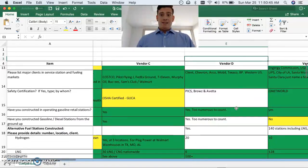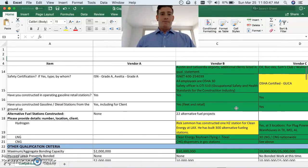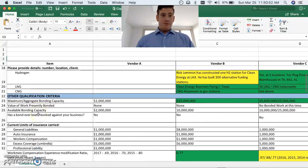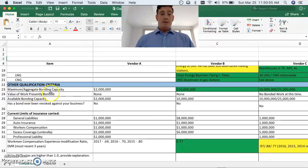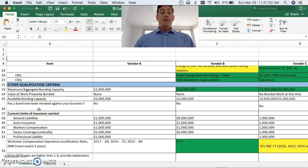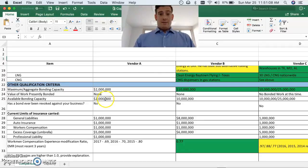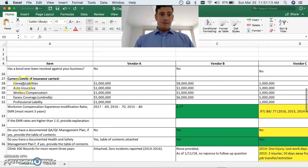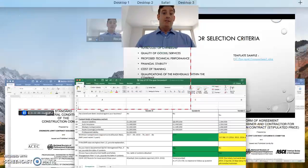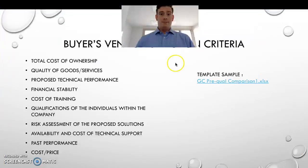If someone put no to that they're kind of out of their league, but they probably wouldn't be bidding on the project in that case. A few other qualification criteria: bonding capacity, value of work presently bonded, available bonding capacity. Bonding information is key because if they don't have an insurance policy for a large number, it's not going to make the buyer comfortable selecting that vendor. We also look at current insurance limits carried.